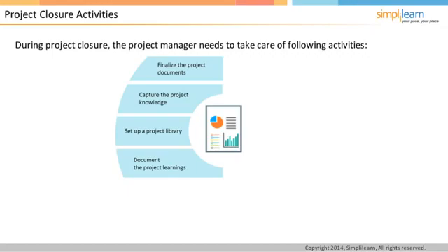Provide knowledge transfer. The project manager needs to provide a summary of the project results to team members, either as a presentation at a meeting or as a formal document. Consultants should not be relieved from their position until they have transferred all the important product maintenance knowledge to the team. Get a final sign-off. Schedule a meeting with the project sponsor and key stakeholders to get their final sign-off on the project.